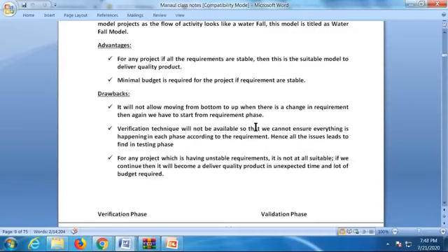Yes, suppose now you are in the testing phase. You are testing a product in the waterfall model. Suddenly the client requests some changes. What do we have to do now? Again we have to modify the SRS documentation. If I modify the SRS, designing should be done again. If I design the software, coding will be done again. One more life cycle is followed or not?